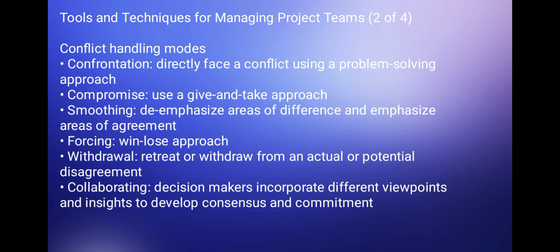Next is tools and techniques for managing project teams, 2 of 2. Handling conflict: confrontation, directly face the conflict using a problem-solving approach; compromise, use a give and take approach; smoothing, de-emphasize areas of difference and emphasize areas of agreement; forcing, a win-loss approach; withdrawal, retreat or withdraw from an actual or potential disagreement; and collaborating, decision makers incorporate different viewpoints and insights to develop consensus and commitment.